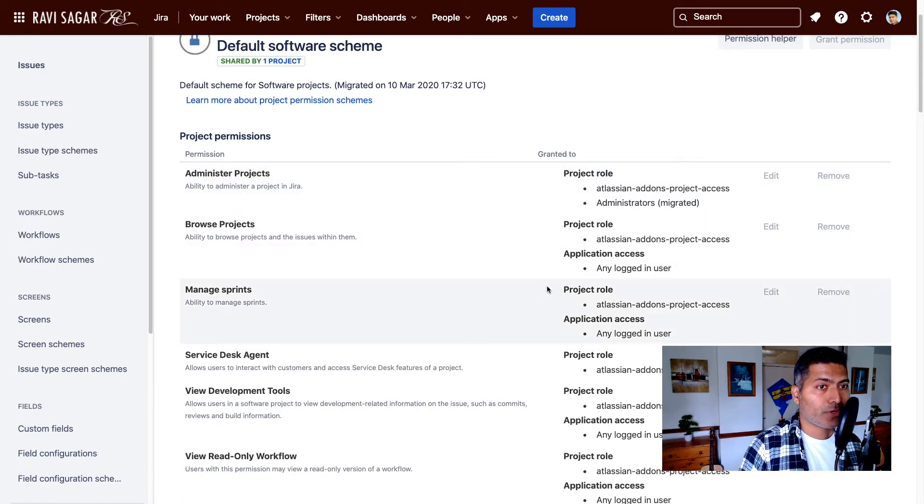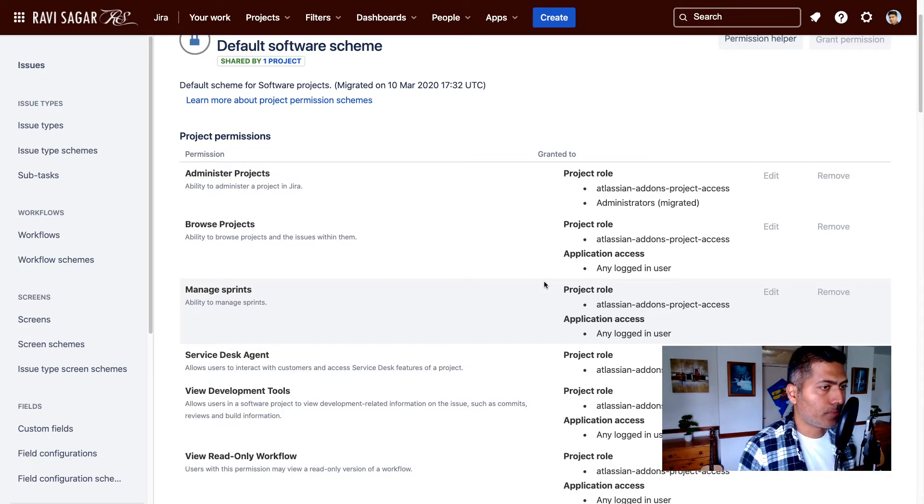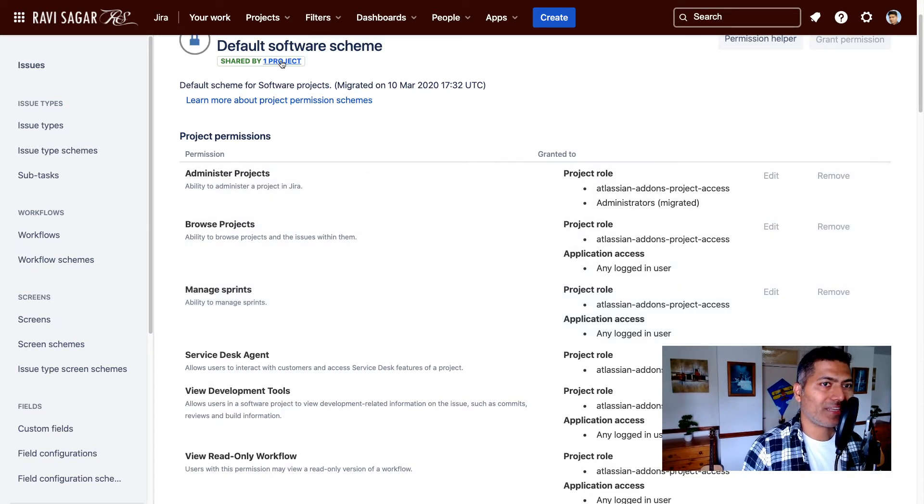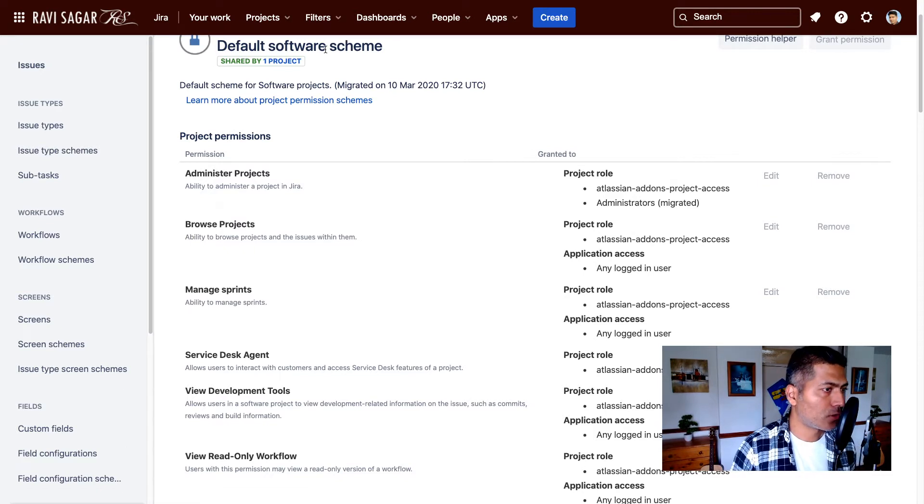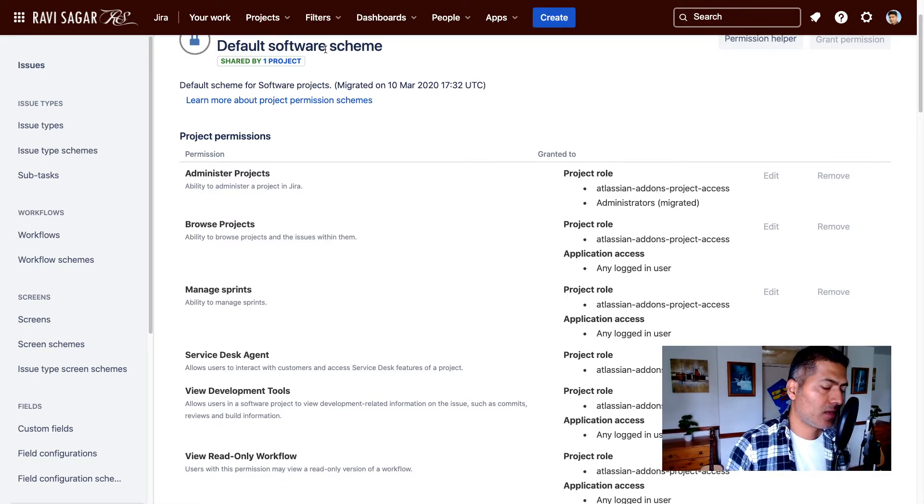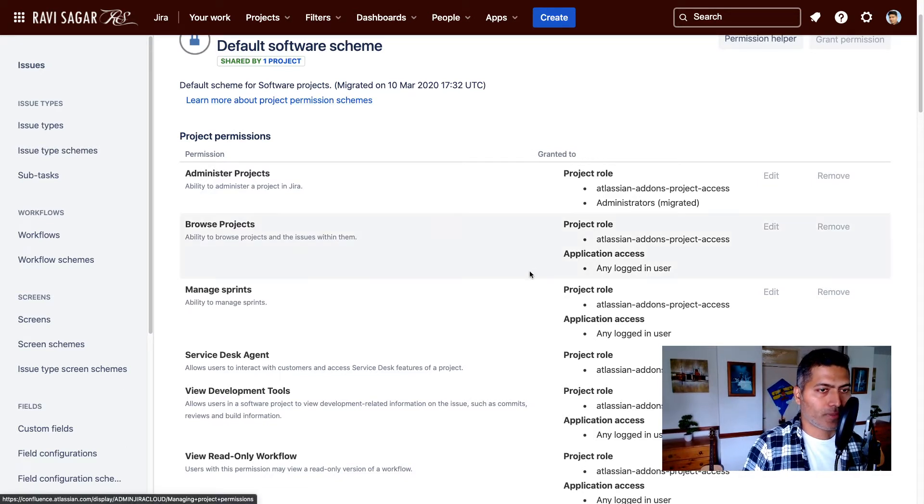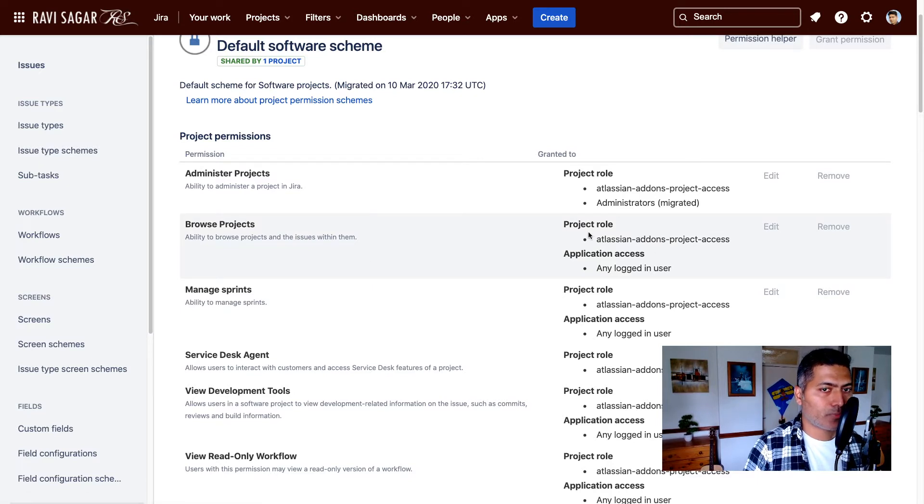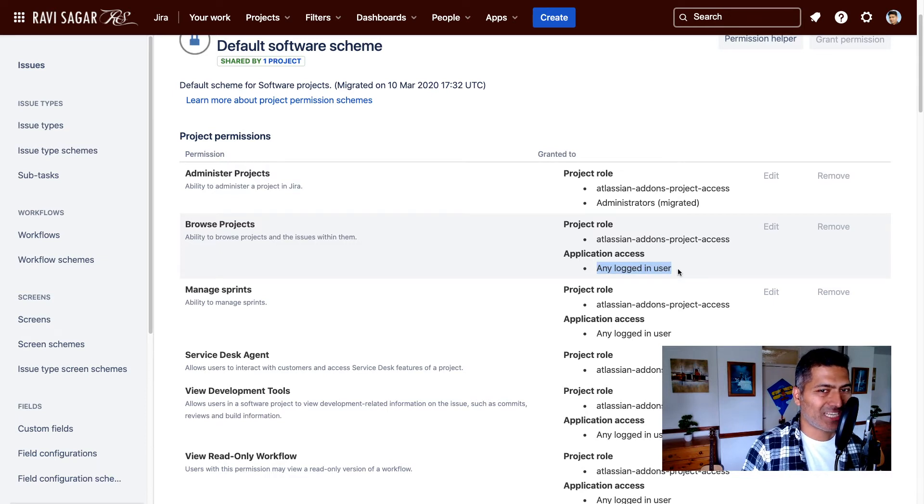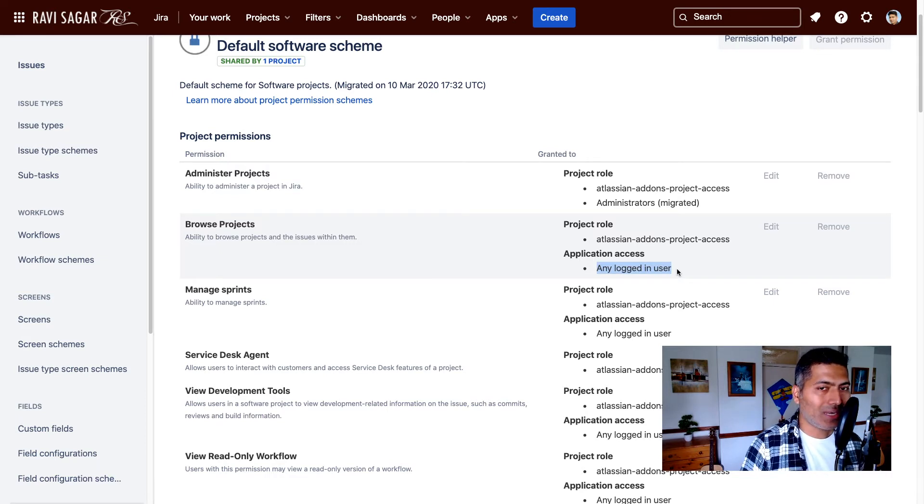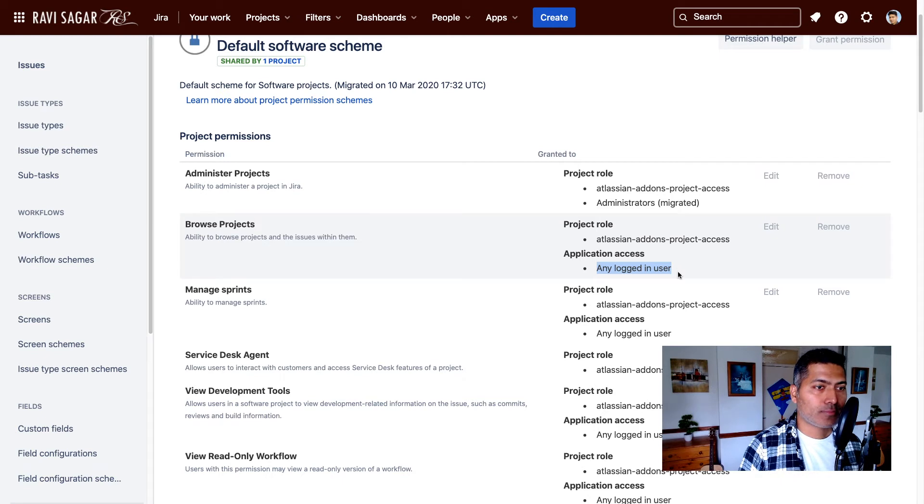So what you can do here is when you modify the permission scheme, don't modify the default scheme, use your own scheme that you can also reuse on other projects. Now, when you modify the project scheme, you can first remove the any logged in user from the application access, and then only add a specific role.